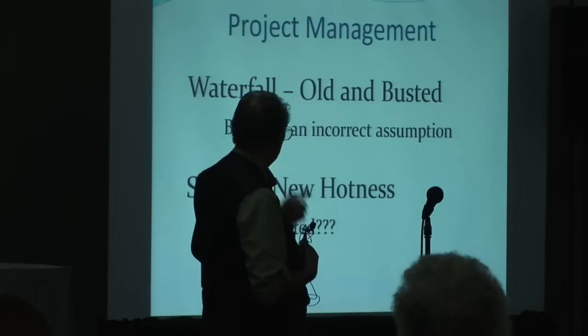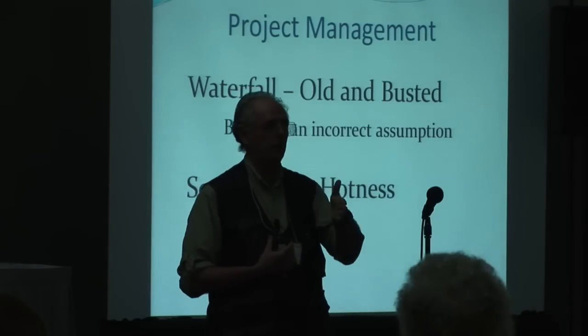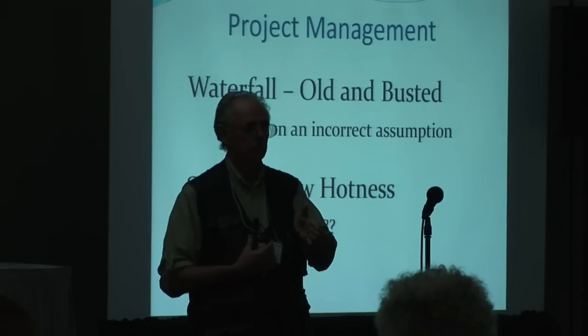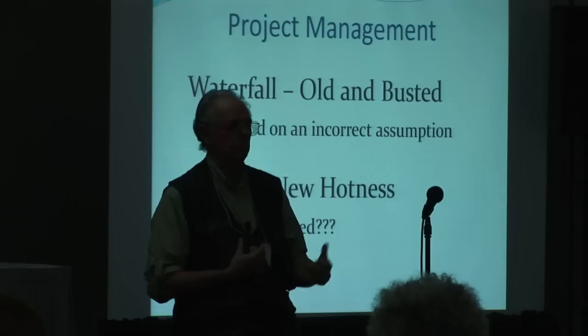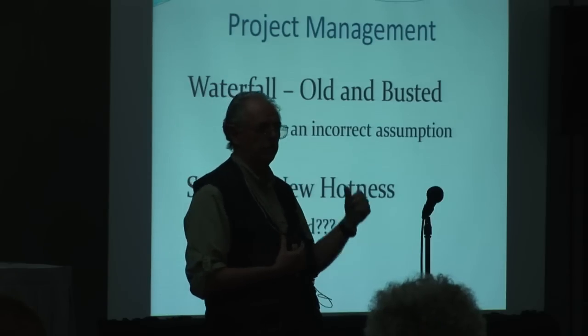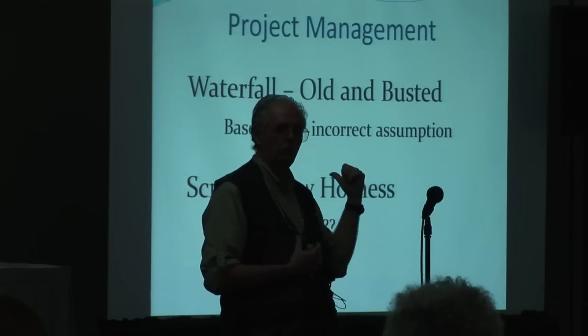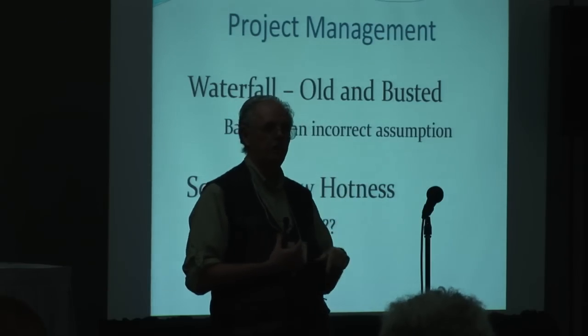And to do that with the old waterfall method, or even the new waterfall method, which is where they overlap, you have the planning and it overlaps the design, which overlaps the development. Even that system isn't flexible enough. That doesn't give you the flexibility that Scrum does. So our original assumptions were off, and we should have never used that. And quite frankly, that was one of my failures.